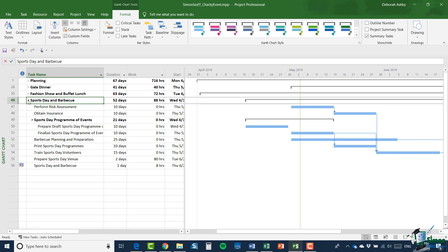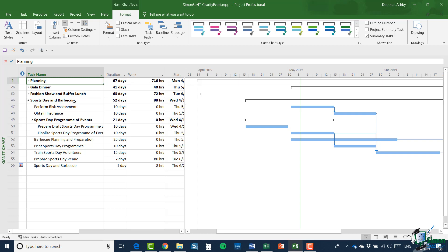Now, let me point out a couple of things before we start. First of all, if you're going to split a program of work into a number of separate projects, it's a good idea to make that decision as early on as possible, because if you've already set the program up as a single MPP file, there will be quite a bit of work to do in splitting it up again. I'm going to show you one or two options for splitting as we go through the next few sections.